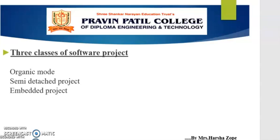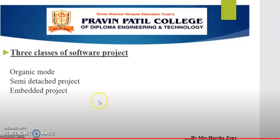In organic mode, relatively small, simple software projects with a small team are handled. Such teams should have good application experience with less rigid requirements. In the semi-detached class, an intermediate project in which a team with mixed experience levels is handled. Such projects may have a mix of rigid and less-than-rigid requirements.